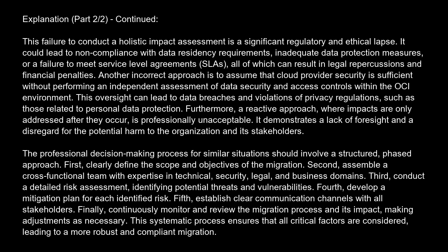The professional decision-making process for similar situations should involve a structured, phased approach. First, clearly define the scope and objectives of the migration. Second, assemble a cross-functional team with expertise in technical, security, legal, and business domains. Third, conduct a detailed risk assessment, identifying potential threats and vulnerabilities.